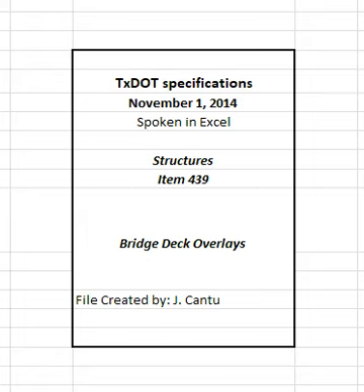Provide sufficient labor and equipment for proportioning, mixing, placing, and finishing concrete overlay at a rate of at least 40 feet of finished overlay per hour. Do not allow traffic other than construction equipment for the overlay on any portion of the prepared bridge deck before the overlay has been placed. Provide side and end forms for supporting the screed and containing the overlay concrete. Provide reinforcement, when required, in accordance with Item 440, Reinforcement for Concrete, and the details shown on the plans.